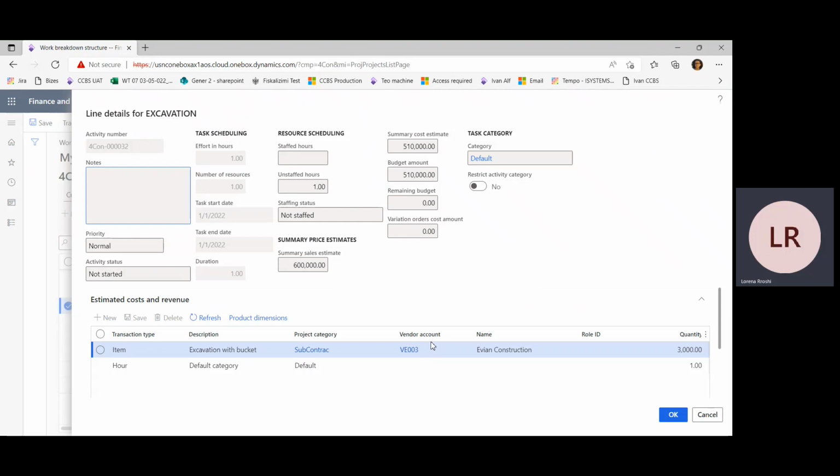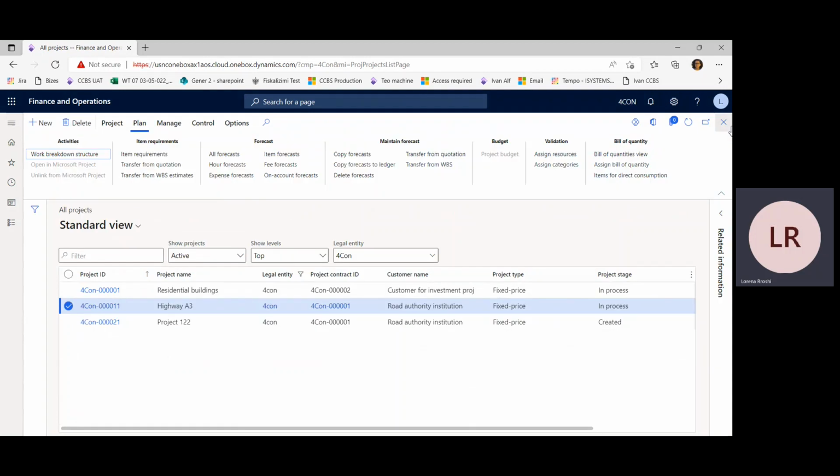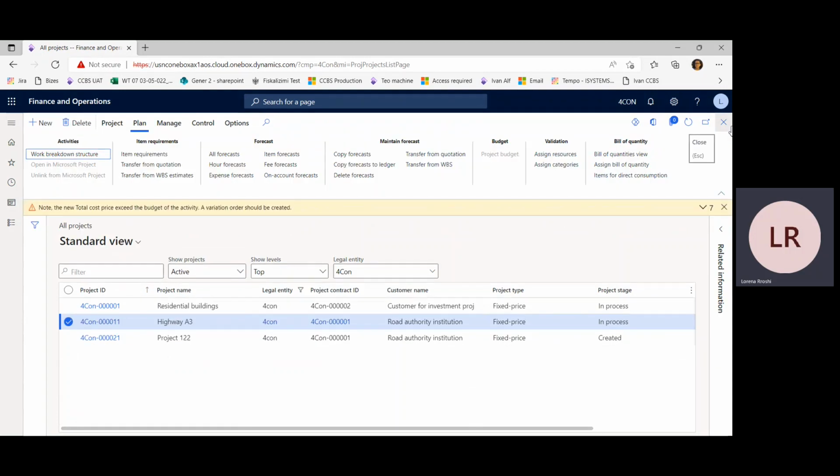And this is one of the other main functionalities of the construction add-on. Part of the construction processes are done by third parties, by subcontractors. In our solution, this will be maintained with a specific functionality to report the work executed by subcontractors. The first step is to create first a purchase agreement for each project and each subcontractor.